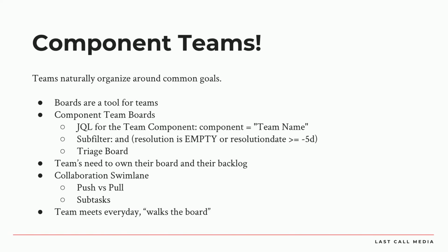One cool thing that you can do is, let's say that you're the creative team. You're responsible for designing aspects that support the website, and you could have a board, and you could have a creative team component. So if issues are getting created elsewhere and they need some of your help, they get tagged with the creative team component, so they show up on your board. But you also have your own creative work that you're doing.